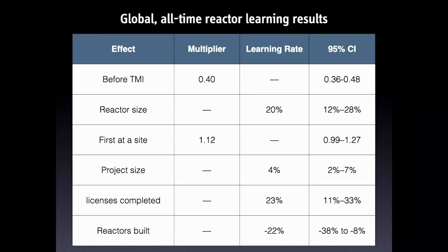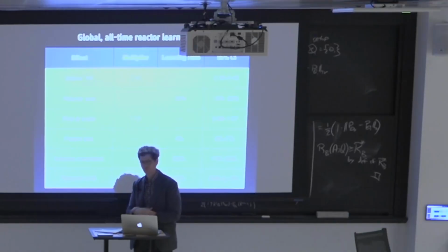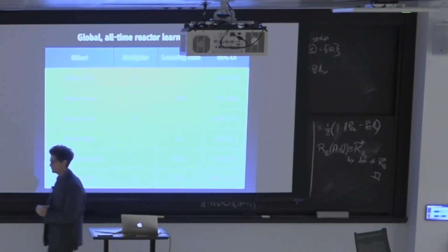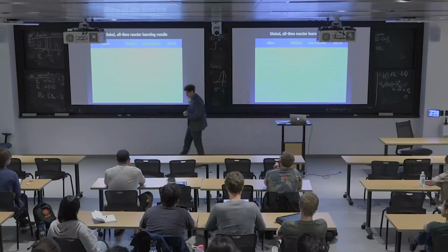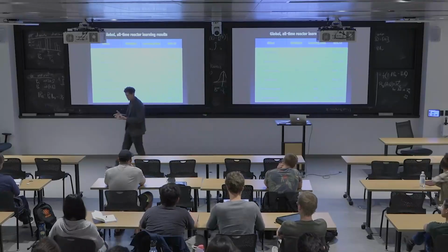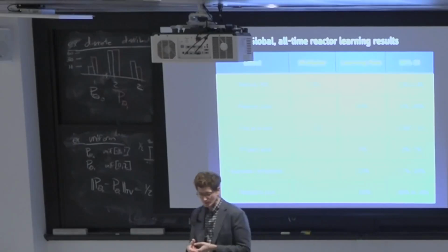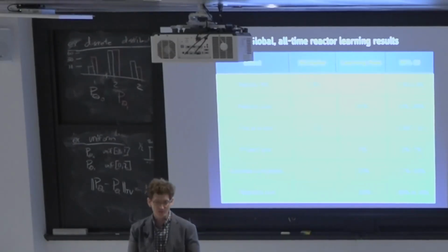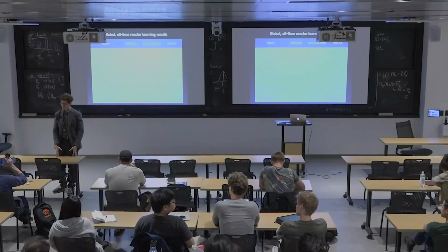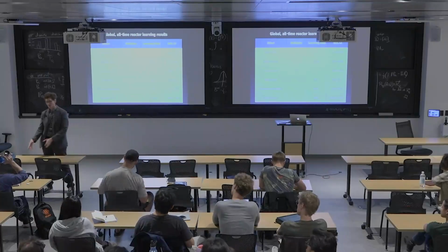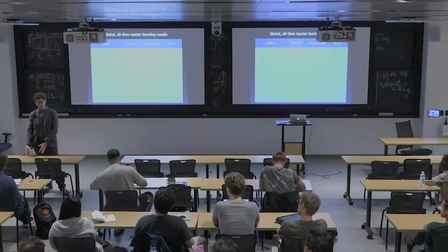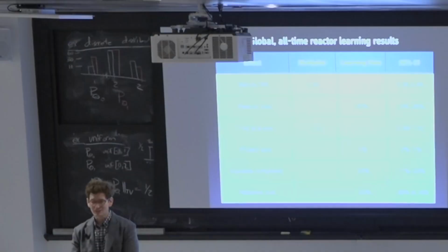While I have this license and built story up here, I think I will use the next few minutes to tell you about the combined operating license. In the United States, we used to have a process where you would go to the NRC and get a construction permit, and then you would tell them what you're going to build. And then after you built it, and it will never be built in the way that you thought it was going to be built, they would come back and give you an operating license.